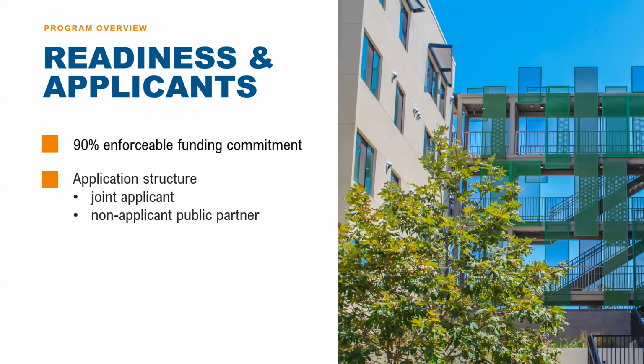Okay, so next we'll talk about another readiness requirement, which is that the project must demonstrate a level of committed funding at time of application of at least 90%. Keep in mind that historically, applicants have been able to count the financing through 4% tax credits as part of the enforceable funding commitment. ASIC funding can also be counted as committed. Furthermore, you'll be able to factor in any committed funding in this application from the transportation projects.